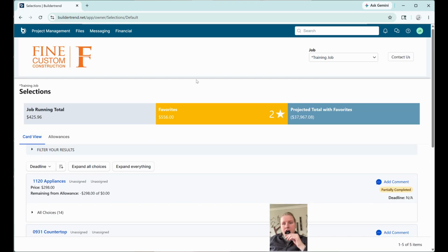Next down is selections. So with this one we can view all of the things that have been selected for your project, whether that is faucets, mirrors, shower glass, tile, countertops. They all live here, and we just like to get a signature to have confirmation that this is what you're selecting and what we are to order before we order anything.